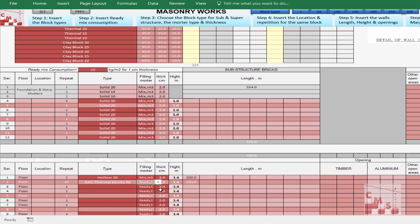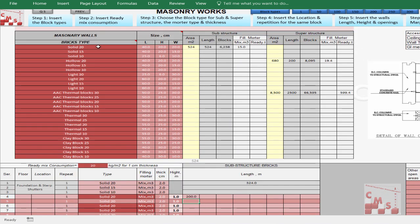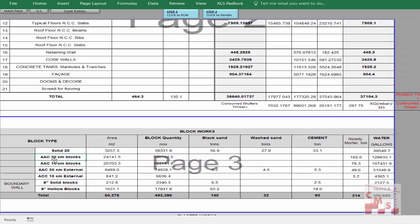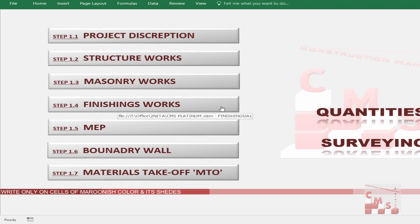Choose the mortar type and CMS gives you directly — for each type of block — the required area, number of blocks, and quantity required as mortar. This is also reflected in the material takeoff: all types of block, area of blocks, quantity of blocks, required mortar material — whether ready mortar or site-mixed with sand and cement — all coming automatically.